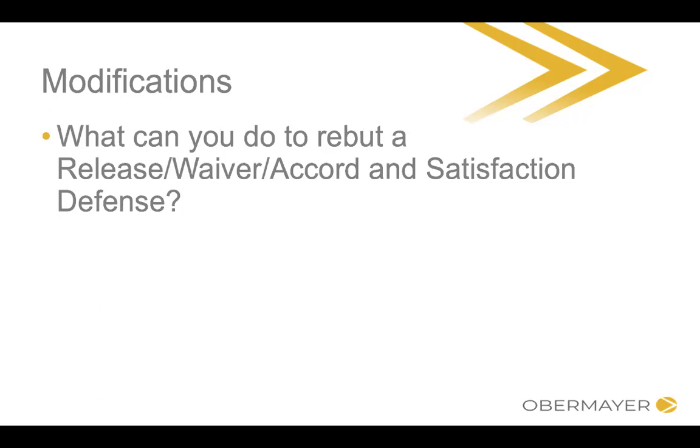Like I said, they're not perfect. So you're going to want to talk to your lawyer about those options if they won't issue it unilaterally, if they won't issue it without the closing statement, if they won't modify the closing statement. Those are kind of like ask 1, ask 2, ask 3. If they won't do any of that, you've got to decide that you're signing the mod, but you're taking some risk, and you're crossing out the mod language or what have you. That's a conversation to have with your lawyer.